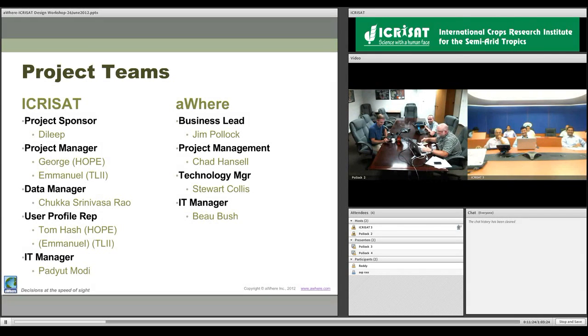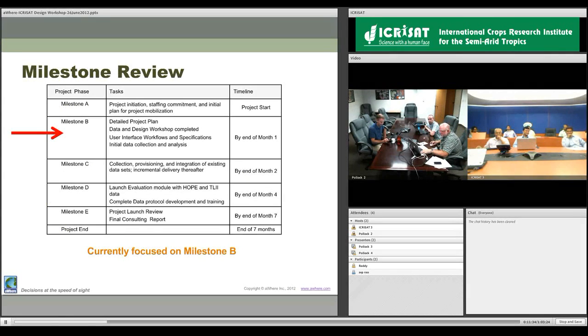Okay. Thank you. So, once again, from the contract that we have between us, we have a series of milestones, of which right now we're in the middle of really focusing on milestone B. So, the original milestone A, let me grab a little pen and arrow here. Okay, there we go. So, hey, I can draw. Okay, milestone A was basically just getting things started, getting our staffing commitments, and the initial plan to get started, which you've already done. So currently we're working on milestone B.